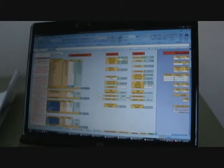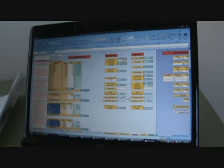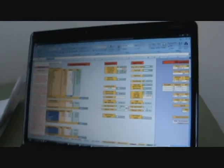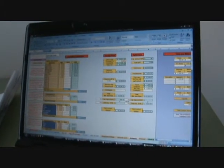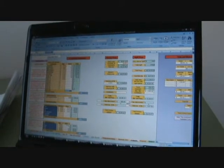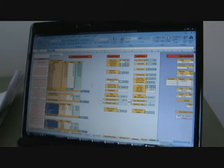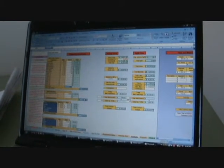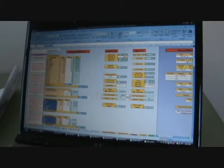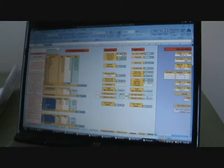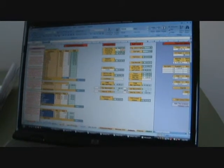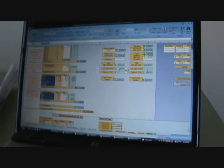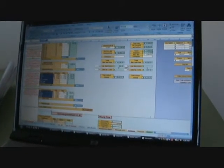And your estimate sheet is your estimated hours per man, different labor rates, with your amount of hours will total up, and this is what your estimated cost is. And if you have subcontractors, you can add them in: trucks, equipment, labor.